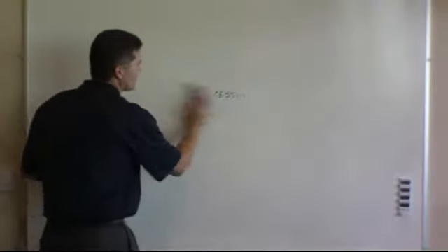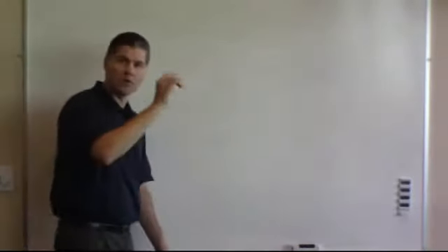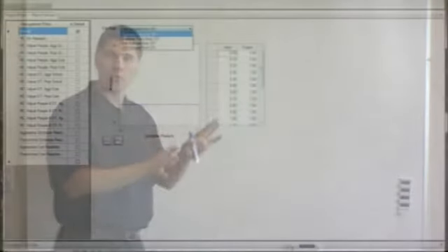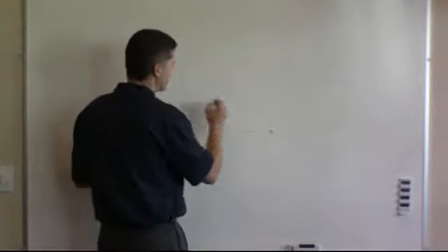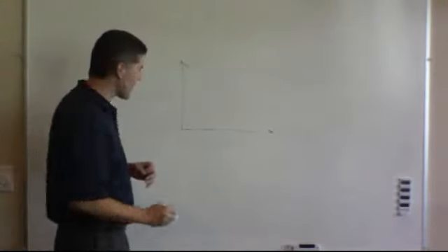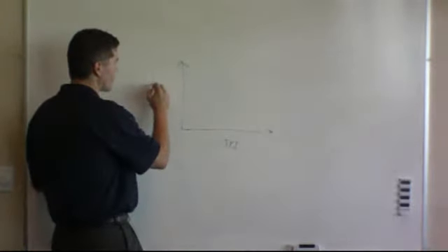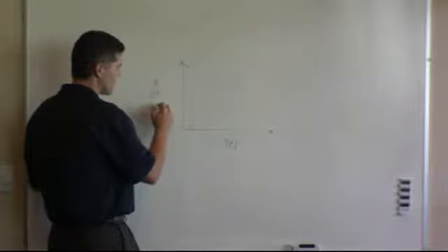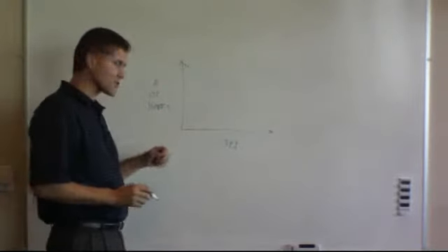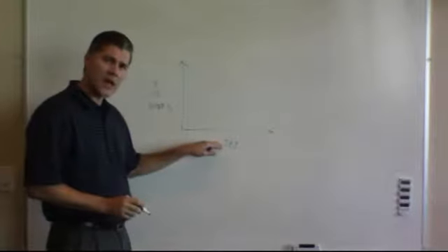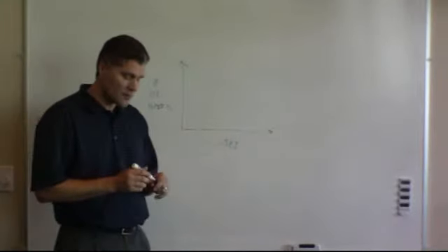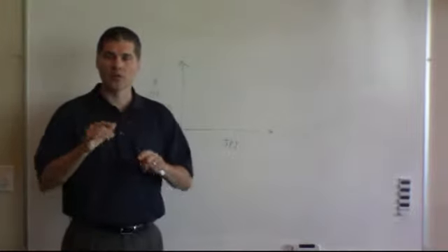So within the management policies, if you click on the drop-down box, you'll see the 4 rules for a management policy. And the first one's going to be, what's the overtime policy based on SPI, the schedule pressure. And we basically have a chart that looks like this, and your SPI value is on the x-axis, and the number of overtime hours is on the y-axis.